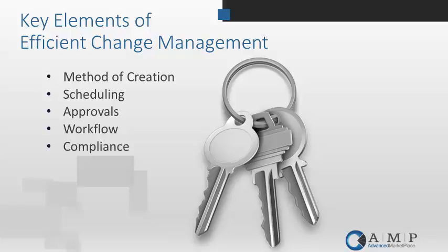You need to think about scheduling. Some organizations have processes in place where they only put changes in, let's say, every Tuesday evening at 10 o'clock. So you want to think about that scheduling. And the other thing that comes in with the scheduling is once you get into a mature change management process, you want to have the ability to approve those changes, let's say 7 days ahead of time or 10 days ahead of time of the actual scheduled record. So you want to start incorporating some guidelines as to when people are going to be submitting changes and when those approvals have to occur.